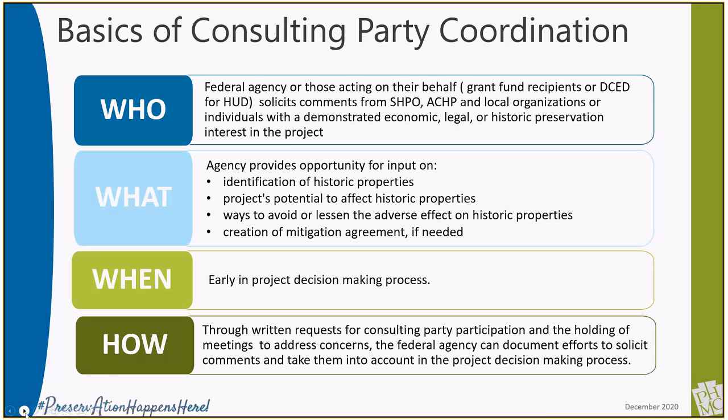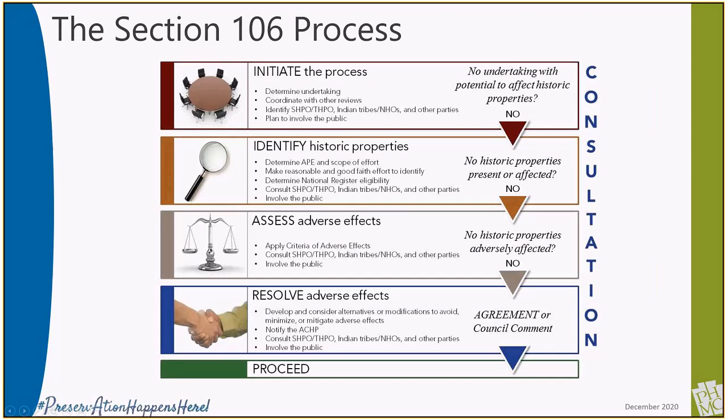The federal agency can document satisfaction of the consultation process by providing a written record of actions taken, including requests for consulting party participation and notes from meetings where consulting party feedback was sought and considered.